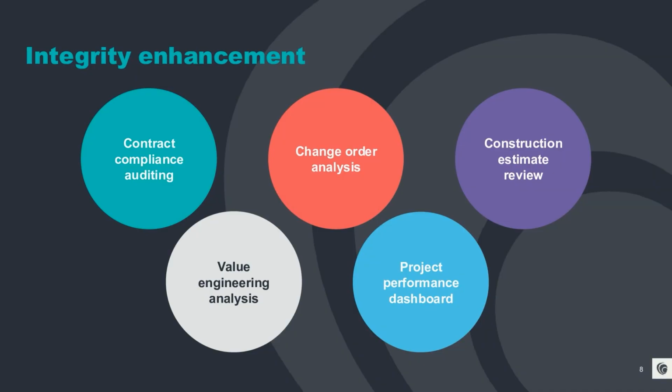So are they estimating accurately? Is it reflective of the correct number of hours that it takes to fulfill that change order? Is it a duplicate change order? Did someone accidentally take a change order that was previously approved and accidentally submit it a second time? And on a project that might have hundreds of RFIs, or requests for information, it would be easy to have something that was duplicate get passed through and approved. All of these lead to unnecessary additional costs.